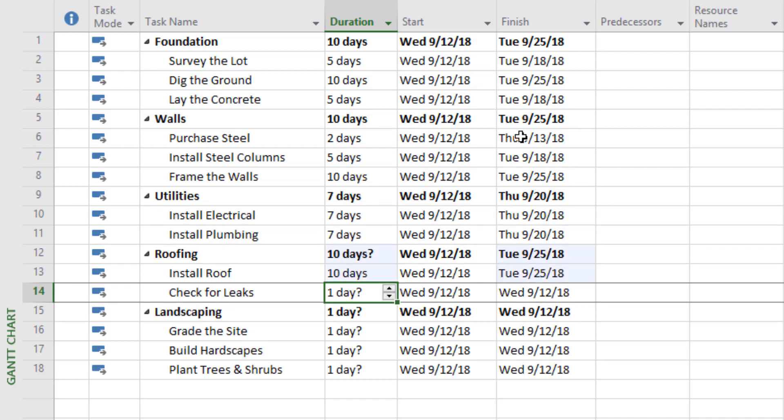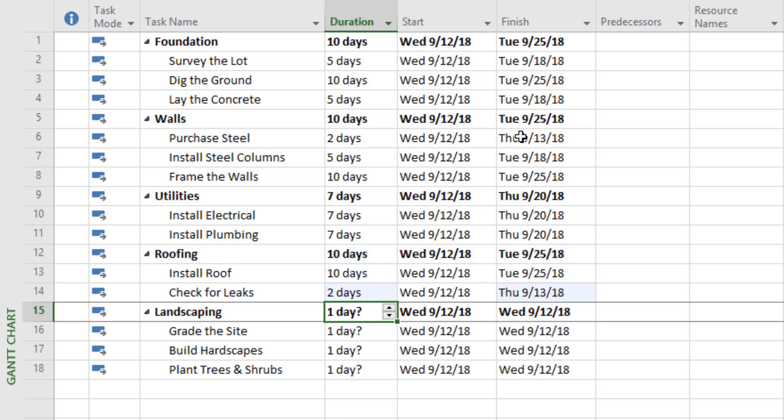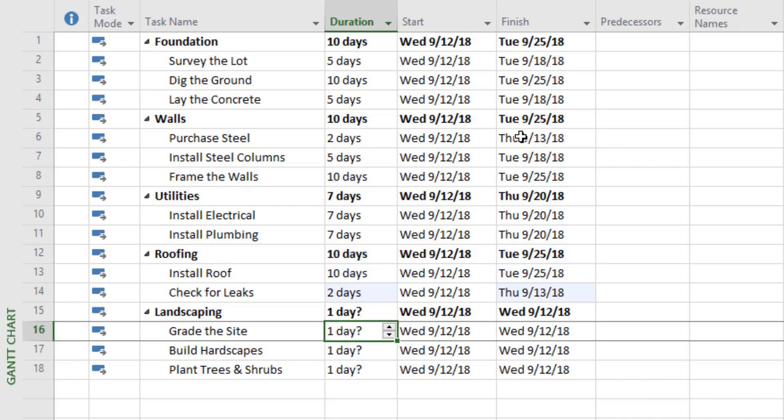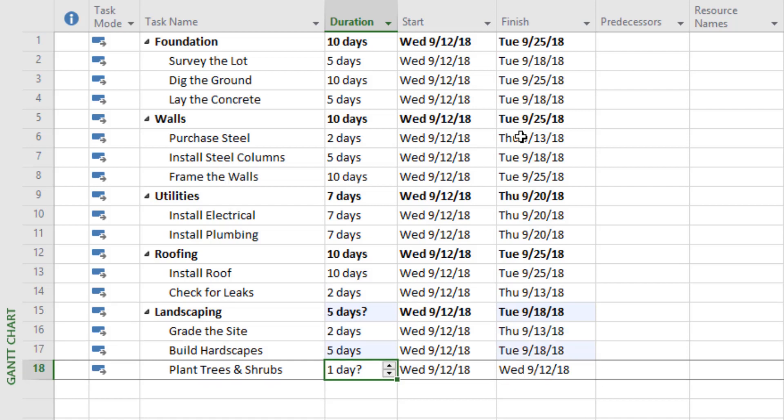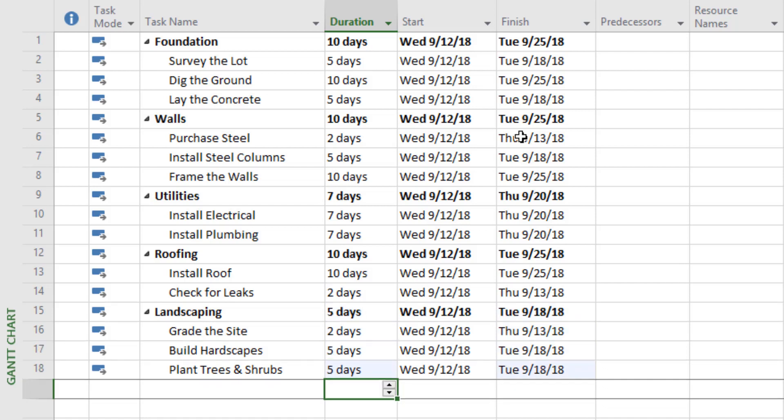Then checking the roof for leaks is maybe two days. For landscaping: grading the site takes two days, building the hardscapes is five, and planting trees and shrubs is five days as well.